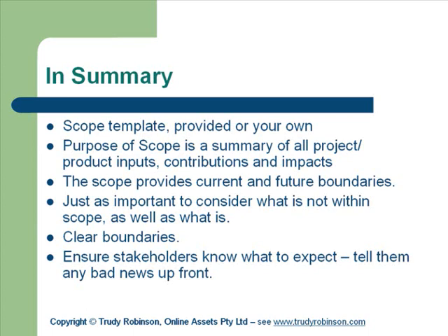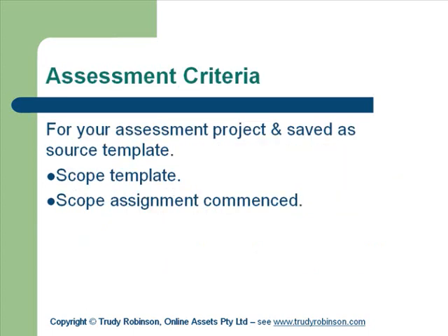But boundaries, from a project management point of view, are not only necessary, they will actually be what keeps you employed. If you don't have those boundaries clear at the beginning of it, and people assume you're going to do stuff and then you don't, it doesn't matter how right or wrong you are, it's your backside that's going to get kicked in the nicest possible way. So think of your boundaries right from day one and make sure that people like the project sponsor, etc., sign off that scope before you actually get to the stage where you present it to anybody else.